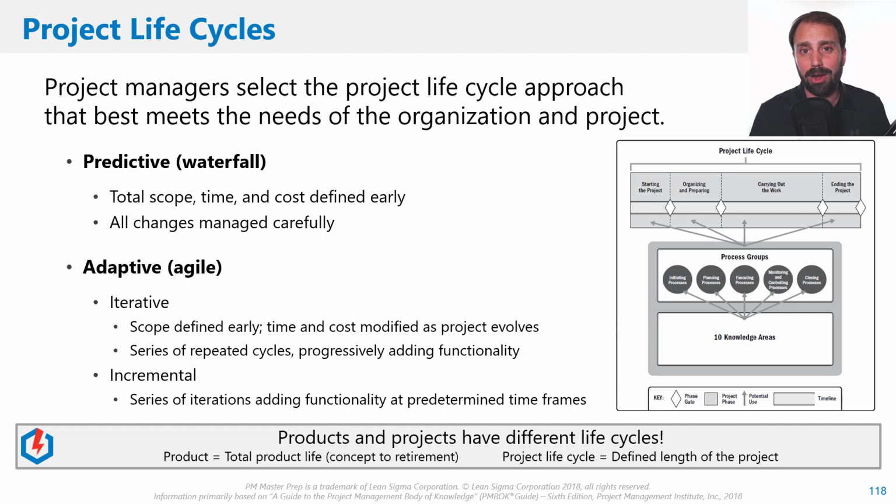We don't need to understand or have worked in this environment before, but we do need to know how it's different than waterfall. And it's different in the way in which we plan and we operate, right? And so we have iterative and we also have incremental, which is a little bit different. In incremental projects, a series of iterations are planned out to add functionality at predetermined time frames. Okay, so it's a little bit different.